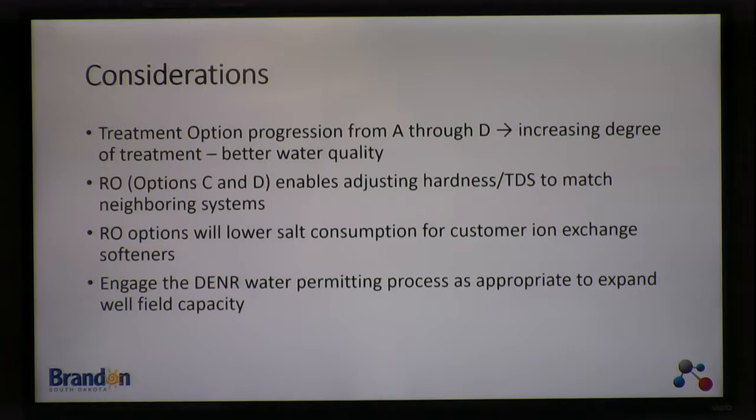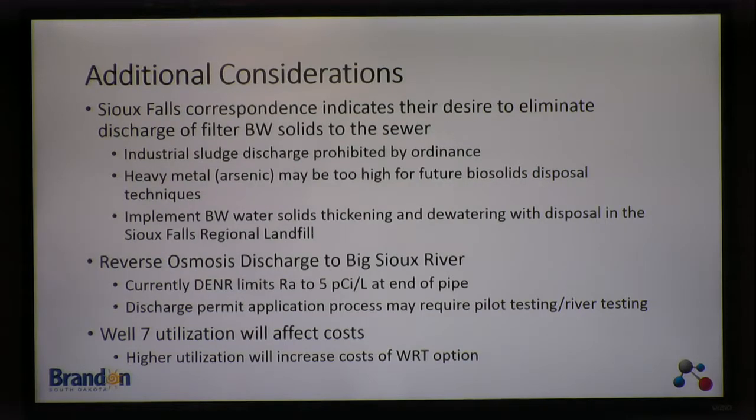And then finally, all of these recognize engaging the DNR water permitting process, and for those options that are focusing on Split Rock Creek, including this additional study with WSP to firm up the understanding of what the future looks like. Additional considerations: correspondence with the City of Sioux Falls indicates their interest or desire to eliminate the discharge of filter backwash solids to the wastewater stream.